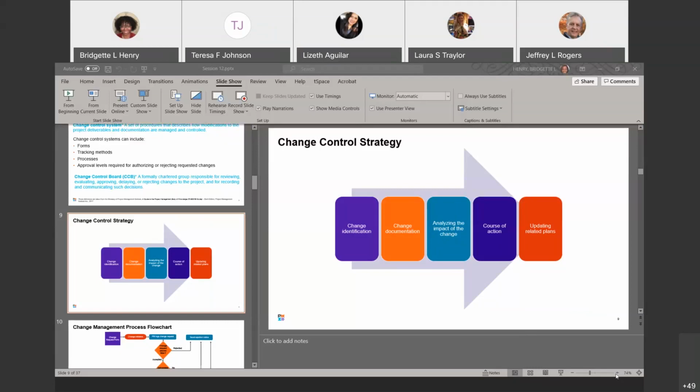The present. Yes. So it is indeed an issue. It's because of what they gave you: the family takes possession in about a month. So something happening in 3 weeks is now important. That's present. If they were taking possession in 6 months, I get where you're going, but you get where I'm going? Yeah. Thank you.